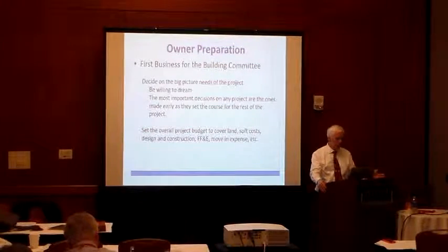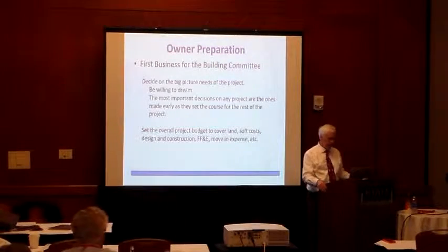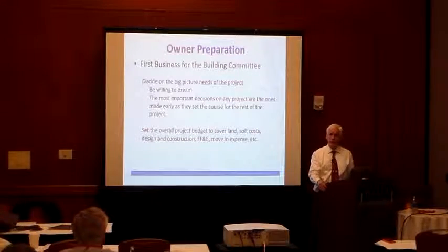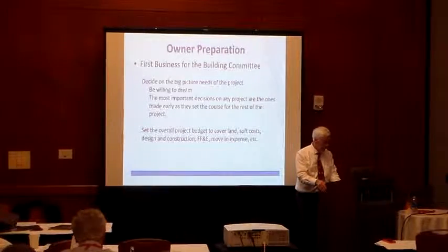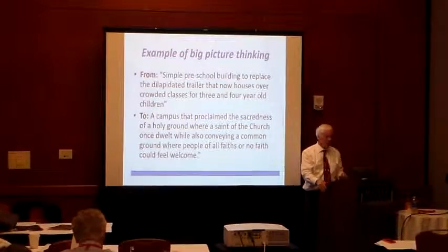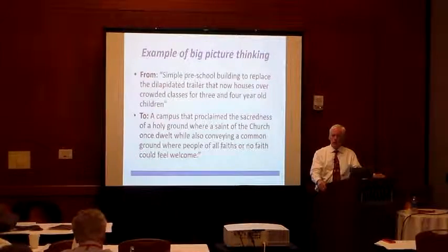Then make sure that the overall budget covers everything. Don't leave out the FF&E, the soft costs, and the move-in expense. Make sure that the building committee understands that budget thoroughly. Now here's an example of trying to solve the wrong problem.